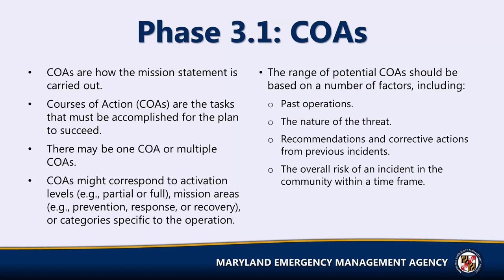The range of potential COAs should be based on a number of factors including past operations, the nature of the threat, recommendations and corrective actions from previous incidents, the overall risk of an incident in the community within a time frame, and senior leader priorities. As multiple COAs are constructed, the plan itself begins to take shape. The COAs form the basis for the plan, and all COAs must align with previously developed plan sections, including purpose,